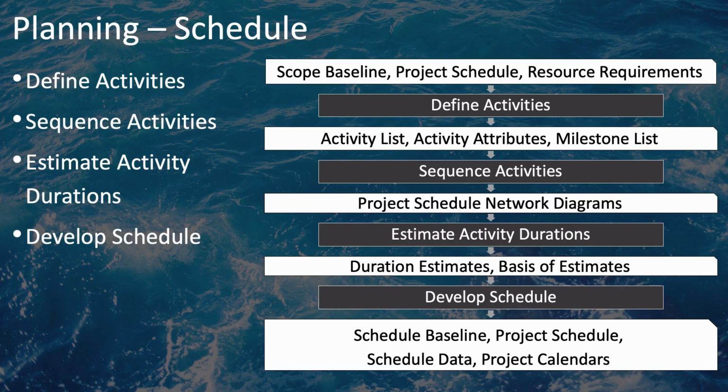So then the next step is to estimate activity durations, which outputs your duration estimates plus your basis of estimates. These are inputs to your Develop Schedule process, which develops your schedule baseline, your project schedule, schedule data, and project calendars.